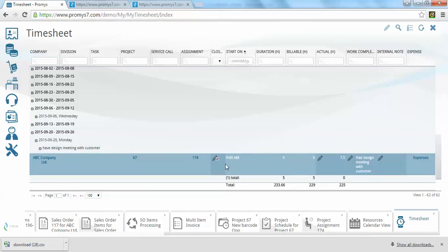There are automated escalations available in Promys, both against the work breakdown task structure and the individual work assignments. So the project manager would get notified that a particular task didn't get done and which work assignment, assigned to which resource, was the cause of that task falling behind in the project schedule. And those escalations would continue based on whatever user-defined notification path that you, the customer, had decided.